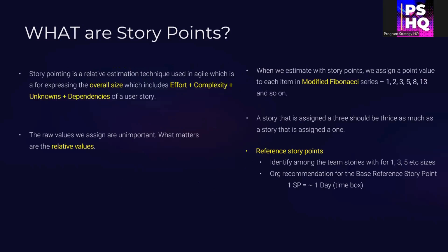Let's get started with story points. What are story points? Story pointing is a relative estimation technique used in agile, and it gives the overall size of a user story, which includes not just effort, but effort, complexity, unknowns, and dependencies.